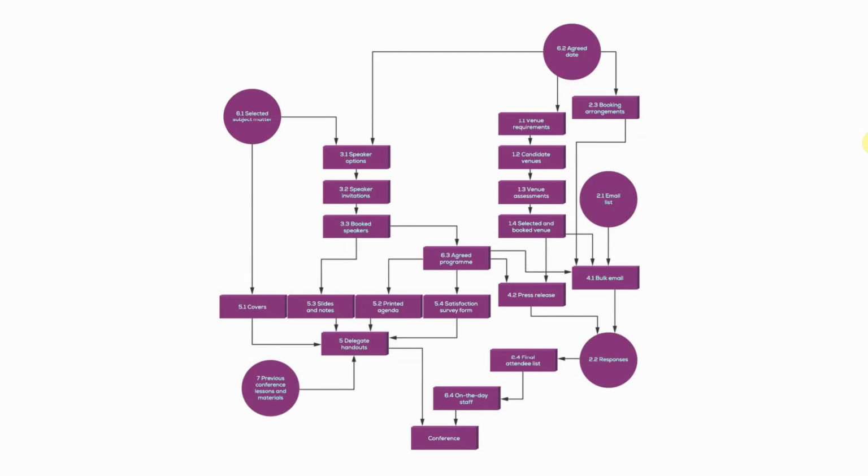Whereas with the product breakdown structure, it doesn't give us any of that information. It just says that your project's product is made up of all of these parts. This diagram tells us essentially where to start in order to come out the bottom here. And you'll see on flow diagrams, your exit point now at the bottom becomes your project product. So if we read it from the top, we'll just follow 1 or 2 of these down. So we've got the agreed date, for example, that's external, it pre-existed. So remember, external products are created outside the scope of the plan, or they already exist. So that agreed date already existed or was chosen before the project.